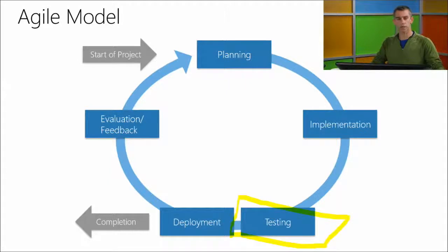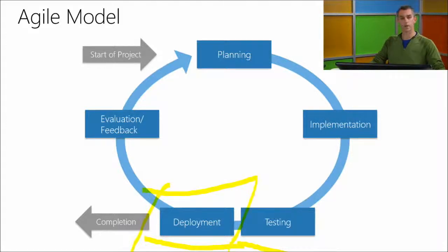That evaluation and feedback time is also really good to get your customer feedback on how you implemented that user requirement, and there may be another requirement that stems from that, or that can go back into your backlog again and get prioritized, and you step right back into the planning phase again.